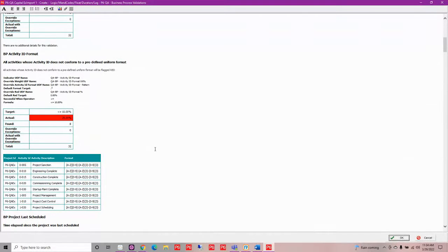What is making sure that it's taking a look at. So I can see on this one here, I have a particular format that's set out, and that format is fairly easy to build out. Here it's telling me it's expecting a letter first, then a number, then a dash, then 3 letters, a dash, and then 3 numbers. So it's going to look for that format and compare it to what we have set out here.